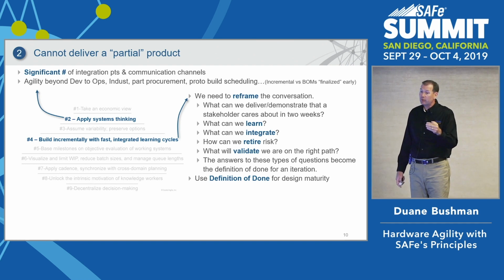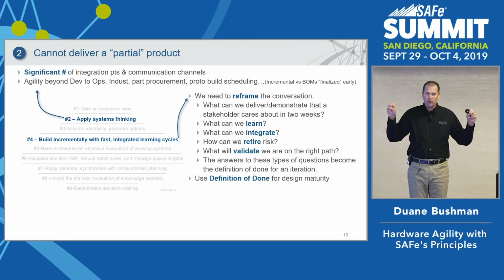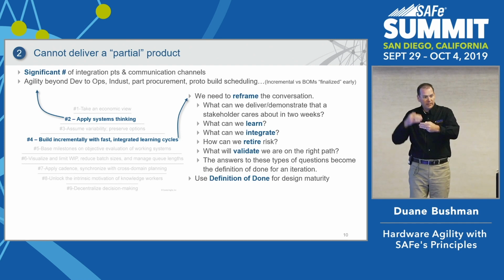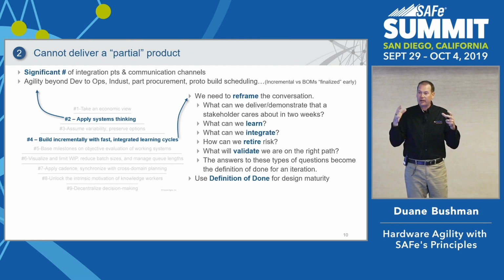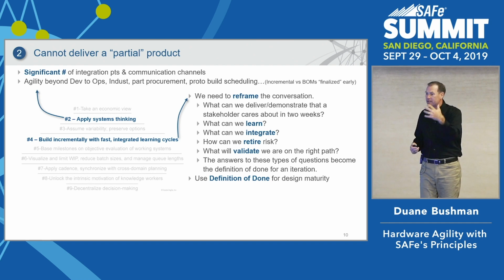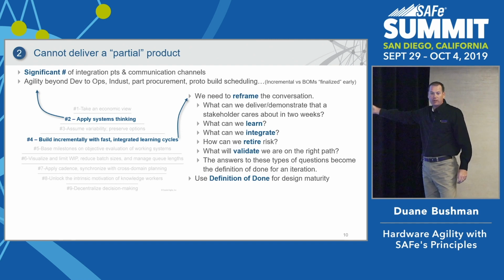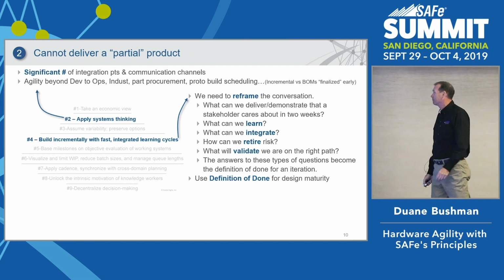So how do we then go through it? You don't walk in on an 18-month project on day one and have no idea what to do, right? Teams generally know, okay, I need to do this, this, this, this. We've got it in our minds. So let's break that down in an enterprise backlog model and have the epics supported by the capabilities, the features and the stories that help us get down to a new definition of done in terms of what we're looking at accomplishing. What are we looking to accomplish and share in that time frame?